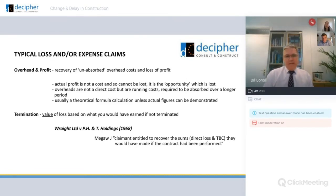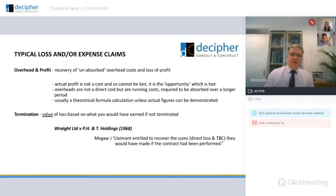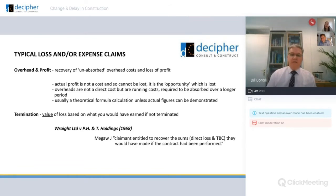On overhead and profit: your loss would be any unabsorbed overheads. Say you have your overheads absorbed over 20 weeks in the original contract. Variations or events have extended the contract by 10 weeks — you've then got 10 weeks of unabsorbed overheads. It's not a direct loss but it is classed as a direct loss. You are entitled to recover those unabsorbed overheads, and once you've proven the theory, the unabsorbed element can be calculated on a formula.